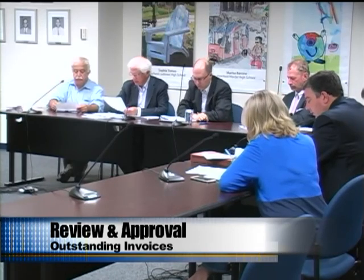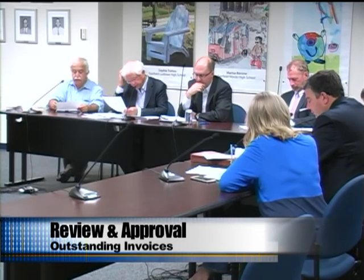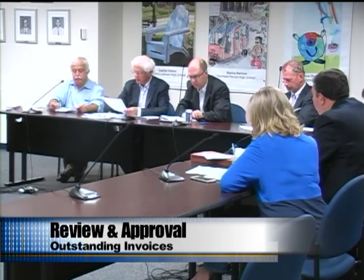Aye. The second one is CR 007, and it is a credit of $2,423. Correct. This is the credit. It's also a change order to the GMP. It's a credit for the deletion of the drinking fountains, the water fountains that we talked about last meeting. There were some questions about some of the backup to that we reviewed prior to our last meeting. It's since been corrected. We recommend approval of this change order. Motion made, seconded, all in favor? Aye.